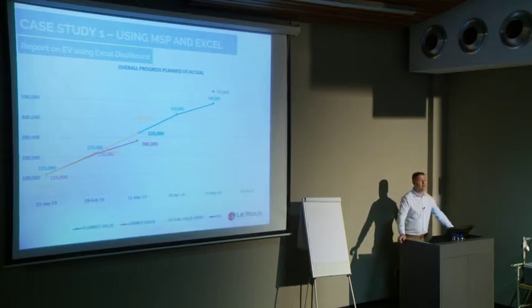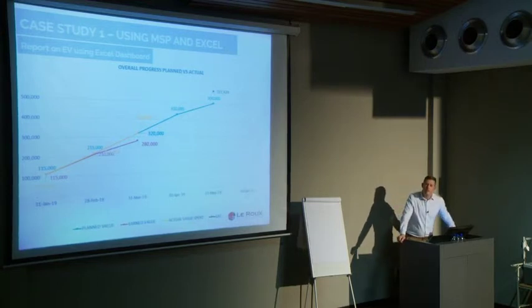What can you tell me about this project if you look at it? Progress? Ahead or behind? Behind? Why? Because we've only earned 280. Where should we have been in terms of progress? 320. So we are definitely behind, and you saw that in the schedule as well, remember?